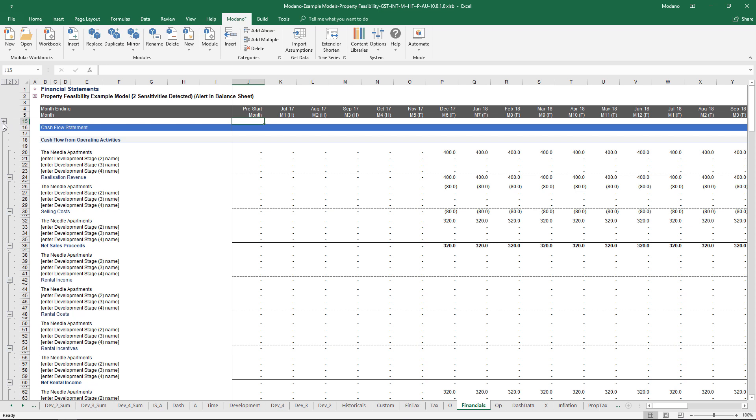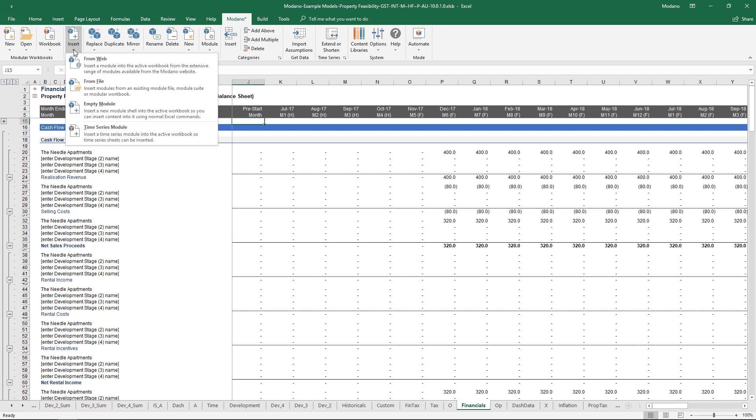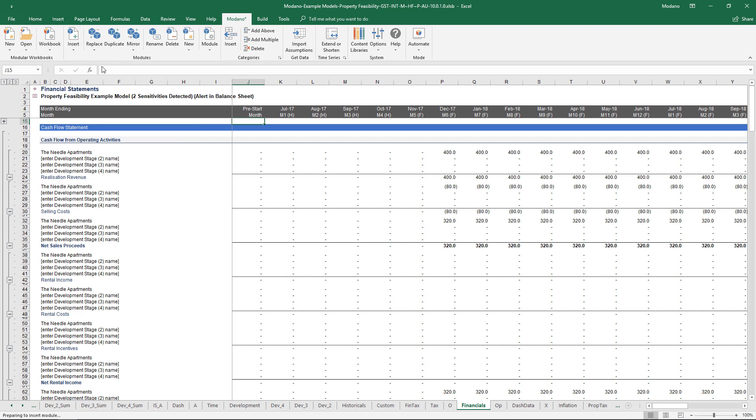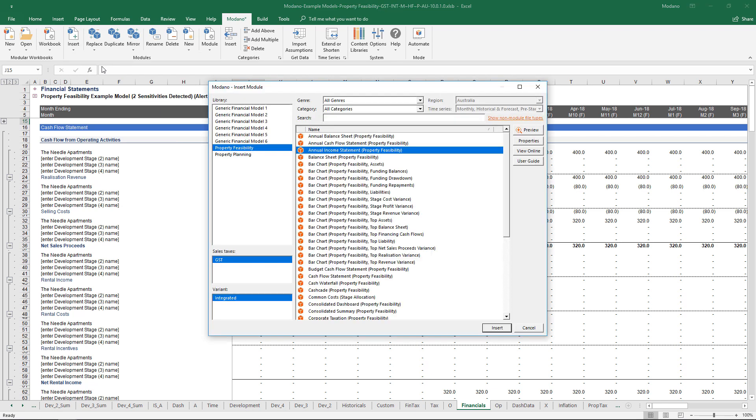That doesn't just apply to the current content that's in there. Obviously if you've got a multi-stage development, there's probably going to be some sort of common costs. This is where the insert from web functionality really comes into its own. If I click insert from web, if we wanted common cost, there's a common cost module. All we have to do is select that, select the type of common cost module we want, and it will drop in.